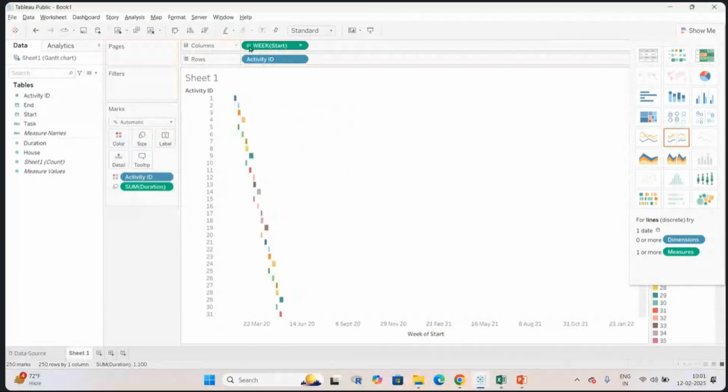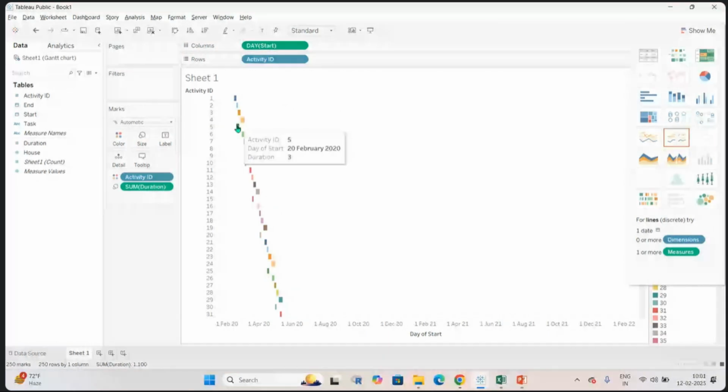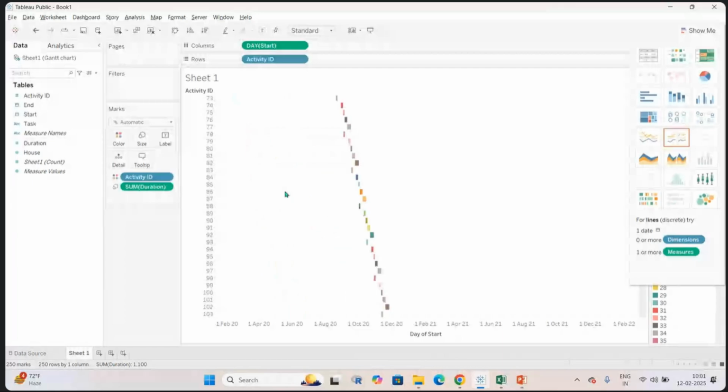And maybe you can go to daily or weekly also. If you take it like this, these are the activities it has given. First activity, second activity, third. There is some sequence to be followed, and activity 3 and activity 5 can be started simultaneously. Only 4 has to be delayed. So this has given it completely like that. All 250 activities are taken like this.